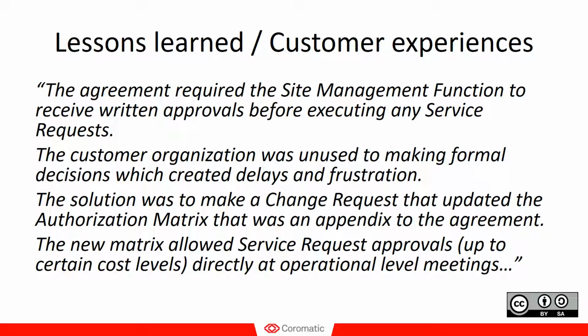And this new matrix was escalated to the tactical level where it was approved, and it was also approved on strategic level, which means that the contract was updated, and after that update, the site management function could have these more informal follow-ups, or pre-approvals, if you like, saying, we're planning to do this. Do you have any opinion? No, that sounds good. And they could deliver these things without the frustrations. So that's a good example of when the intent was good to keep in control, but it actually blocked a pragmatic work environment.